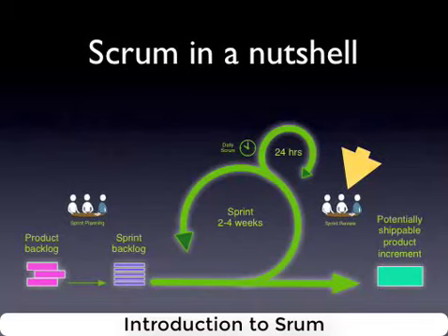That also means that, for example, for those who are implementing Scrum in a large organization, shorter sprints mean that it's easier to defend the process from the business organization, because 2 weeks of advance notice is something you can expect from any decent manager, and it's easier to push back requests to break the structure and throw away the sprint and start doing something else mid-sprint, which is exactly what we are trying to avoid. This deal that the sprint backlog is not changeable, that whatever we do is not changeable for the duration of the sprint,